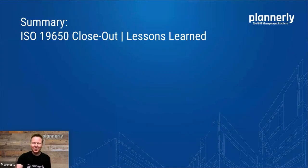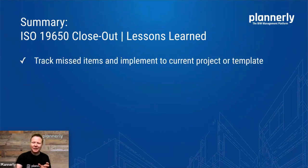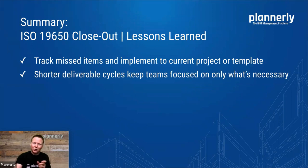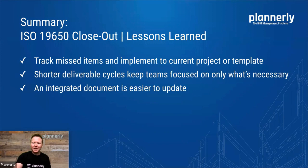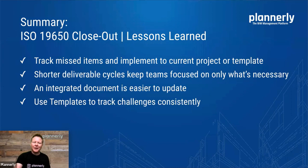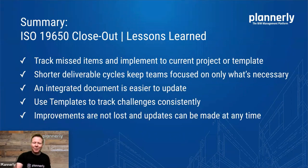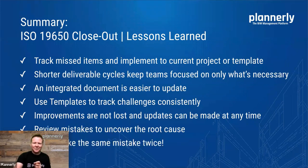So we talked about five different lessons that you could not wait until the end of the project for, but could iterate on using a more integrated workflow: tracking anything that you missed and improving your scoping templates as you go; making reviews more focused with shorter cycles and a leaner approach; integrating the opportunity to collect lessons learned — whether good or bad — simply as another tab teams can access and update; tracking from origin to exit of a project everything that has changed from the template, with full history of who changed it, why, and what the status changes have been, ensuring improvements are not lost; and digging in to find the root cause and not making the same mistake twice — not being insane, as Albert Einstein would say.